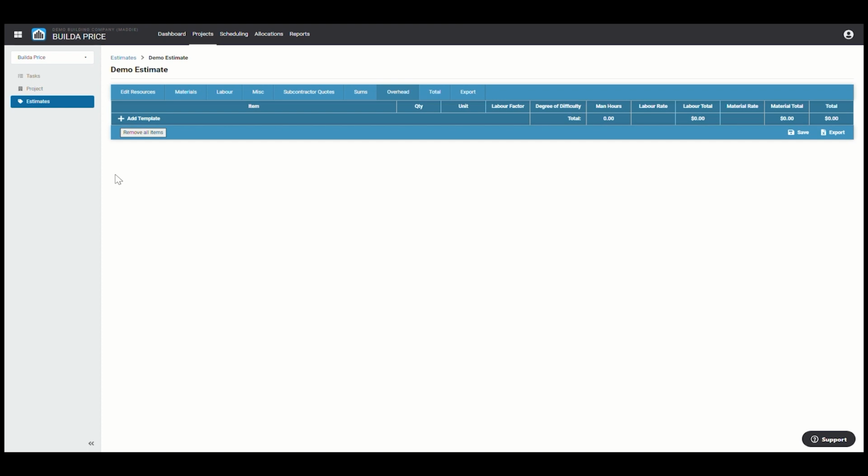Overheads are commonly known to builders as P&Gs. This section is updated and maintained the same way as miscellaneous templates, though accounting for business operations and unproductive time on site, such as administration, supervision, deliveries, cleaning, and other important costs to the business whilst the project is underway.